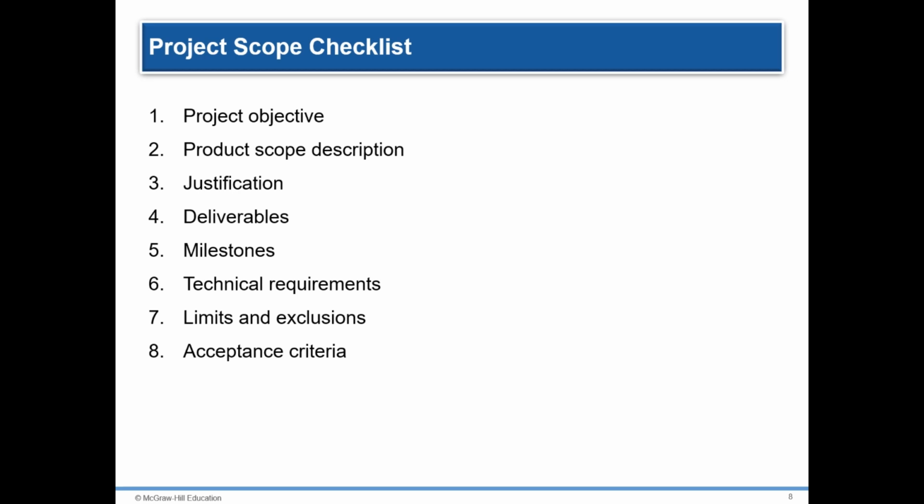Third, milestones. A milestone is a significant event in a project that occurs at a point in time. The milestone schedule shows only major segments of work. It represents first rough-cut estimates of time, cost, and resources for the project. The milestone schedule is built using the deliverables as a platform to identify major segments of work and an end date. For example, testing complete and finished by July 1st of the same year.